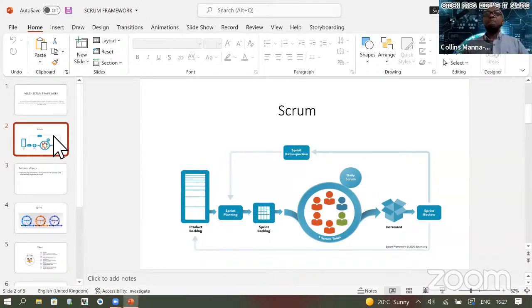You sit there in that meeting and take one of those functions which Mr. Ash said is our priority, that I want us to develop. So I want you to develop the admin screen. And that particular part, the product owner will write in the form of a user story. What is a user story? He says, as a user, I want to be able to log onto this screen. Or I want a screen, a functionality, where all my customers or all my employees can log in and do their job effectively. That's a user story. It's really vague.